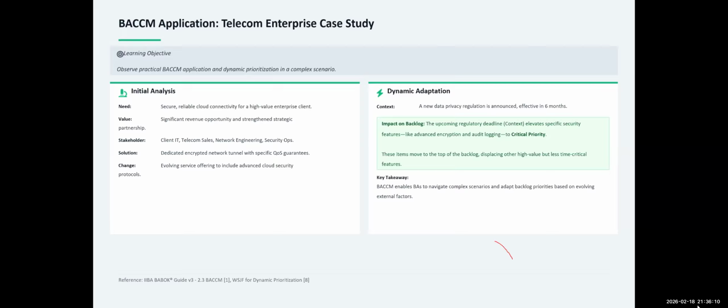In terms of benefit, is it beneficial to the stakeholder? The product owner, is he really looking at it and saying, okay, I need this, and this is the value attached to it? Can we estimate how long it's going to take us to deliver it, right? Is this small? Is it something we can finish in 2 or 3 weeks, right? And is it something that we can test?